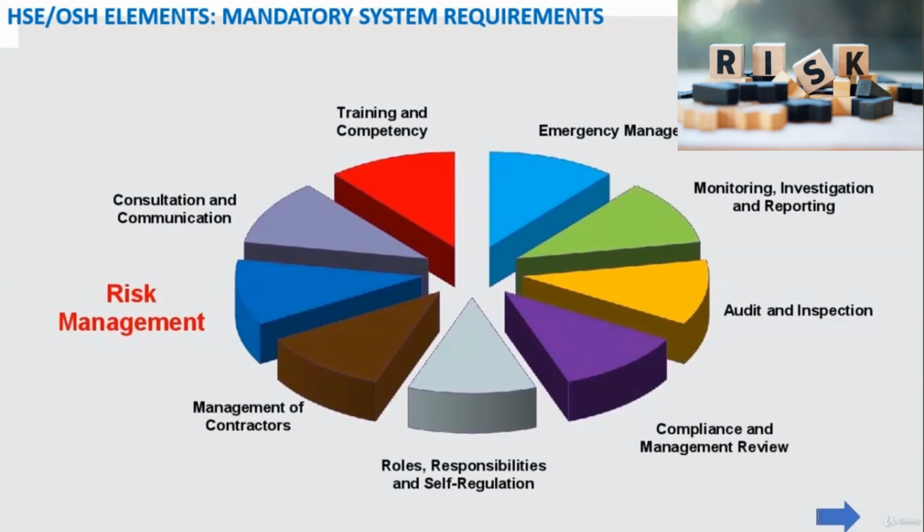You have to do a risk assessment, risk management, and risk mitigation control measures, quantifying the risk into a matrix, and again control measures for that risk. Then again reviewing that risk, identifying additional control measures. Then again reviewing the risk and coming to an ALARP level, as low as reasonably practicable. That is called ALARP. Whenever a risk comes to the ALARP level, your company can run without any hindrance.